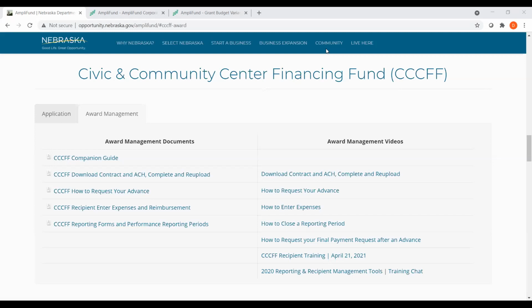But the final payment request and that final closeout form, that final report that we looked at, will not be submitted until the end. So every 6 months, you'll have those due where you have to enter in expenses and performance plan achievements for that specific 6 month period of time. But the payment request and that final report will not be required until the end of the program.